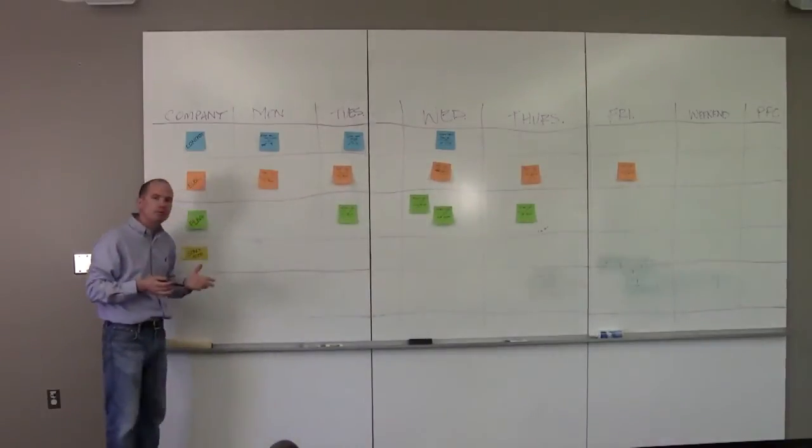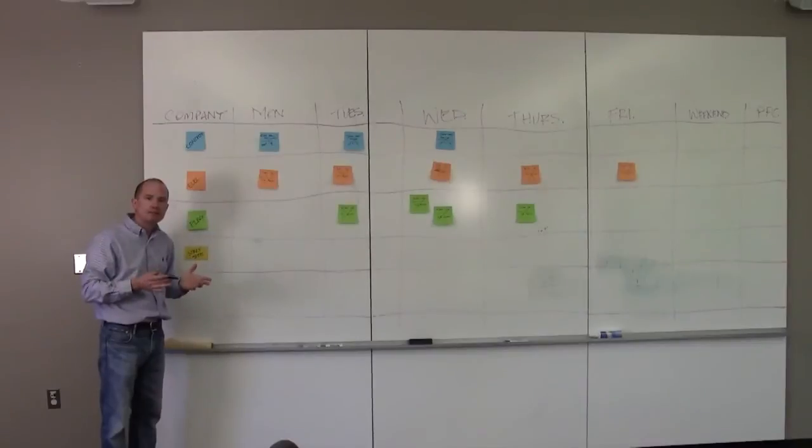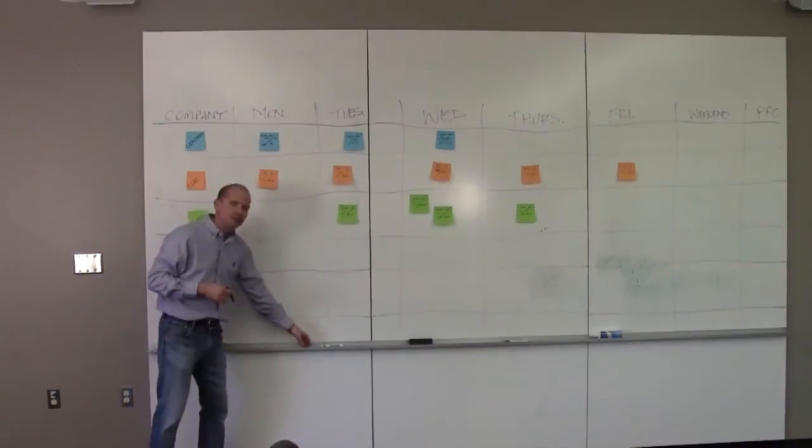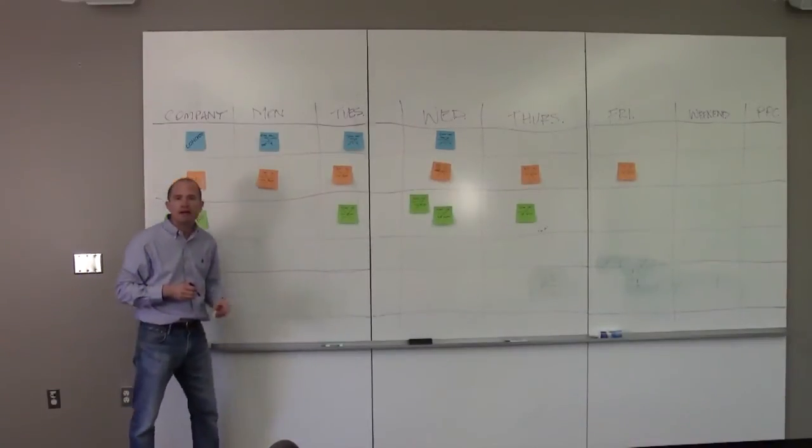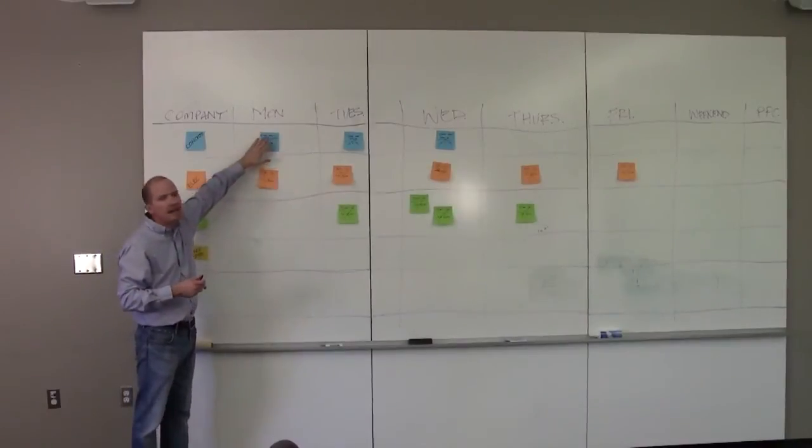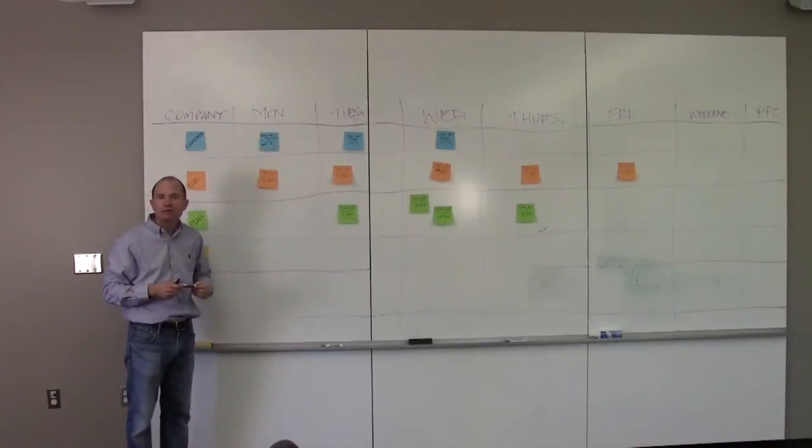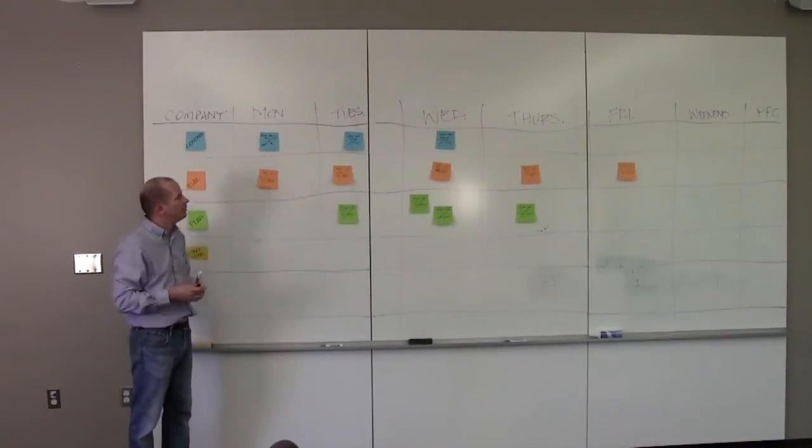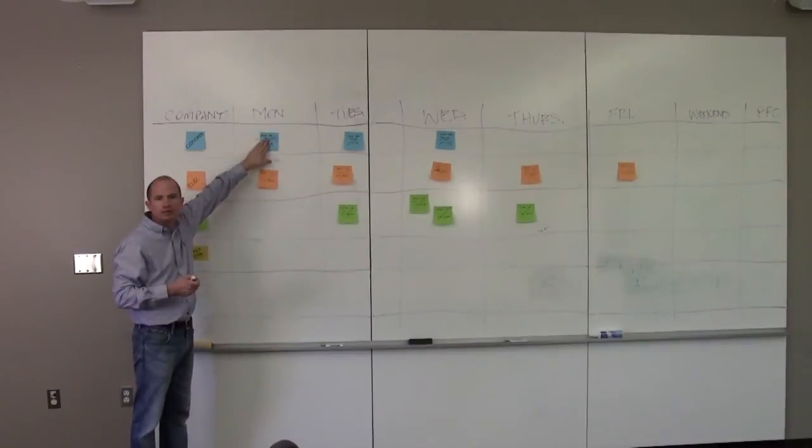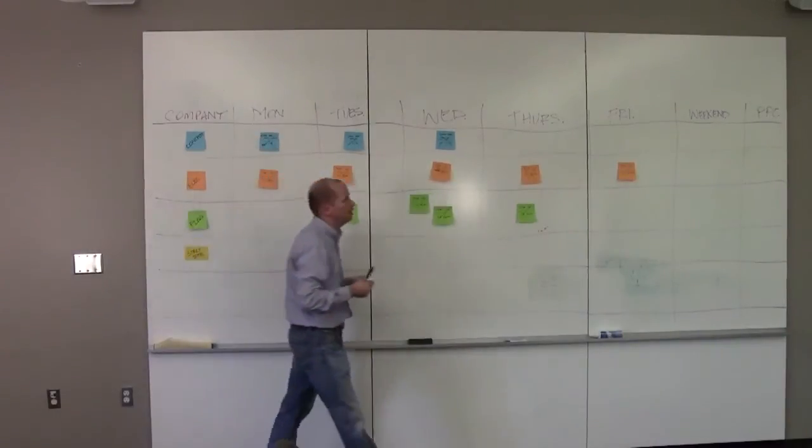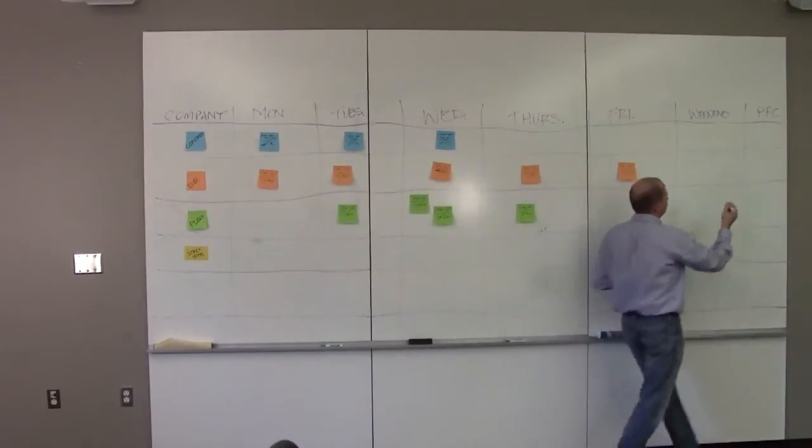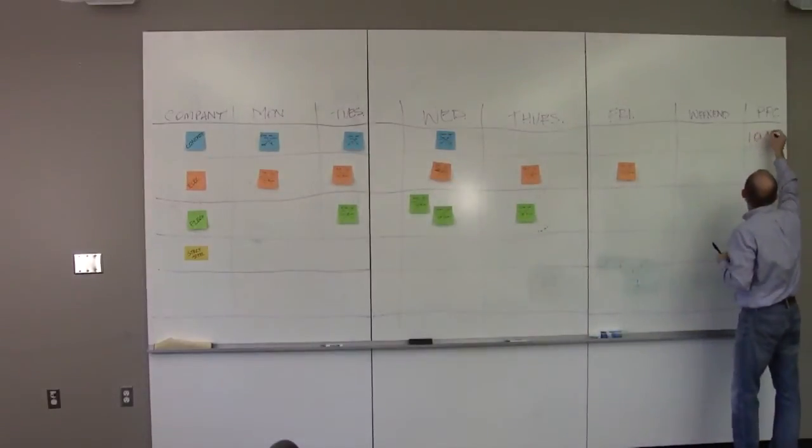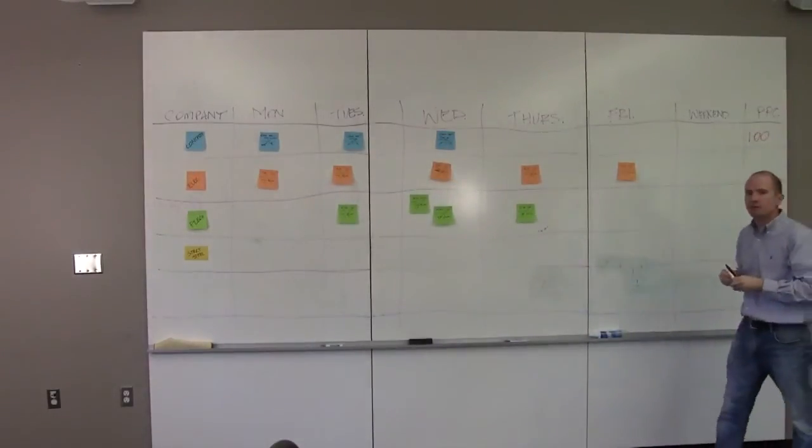So it's a simple way of tracking the percent plan complete. All you do is divide your task by your completed task, the task with an X on it, by the number of tasks that you have. So this one's easy. Our concrete guys are tracking that 100%. So you can just walk down here and write 100%.